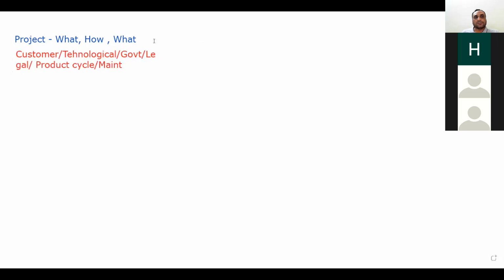So when you go to answer what the project is, then you will find out how much the cost is. First we will have the high level estimates, right? And these high level estimates, if I give you the background, are based upon assumptions. When we were making assumptions, what had the business analyst performed? Gap analysis. And gap analysis came along with a feasibility study, which contains what the gap is, how we can fulfill it, what options are available to fulfill the gap, what their technical and operational feasibilities are, what the benefit to cost ratio will be, and how it will fit the current organization requirement.